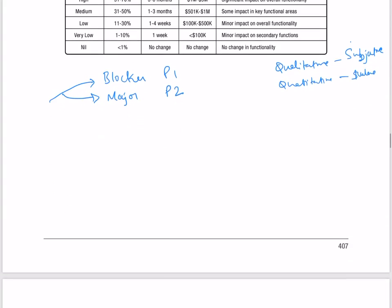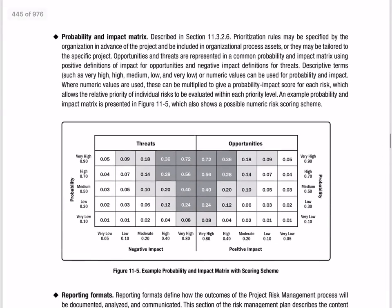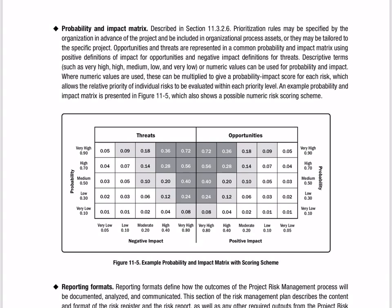I'll show you one more table — let's scroll down. The probability and impacts matrix. So you see here, risks with opportunities and threats — you can put a table like this and see those risks. For opportunities, very high: the probability value is 0.9 and the impact is 0.8. So the probability impact is the product of probability and impact — 0.9 times 0.8 equals 0.72 — and this is a high opportunity risk.